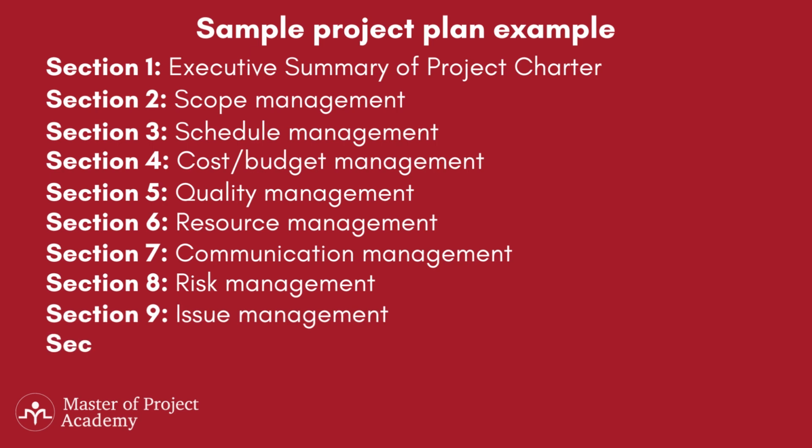Sample project plan example, section 10. Procurement management example. Normally this section would include information related to physical and human resources that can be procured, thus ensuring that the procurement of hardware including computers, development servers, and test servers are planned and managed properly. Also, it describes how to leverage project team staff members from an external vendor. Additionally, it can go into more explicit details to include project staff acquisition strategies.